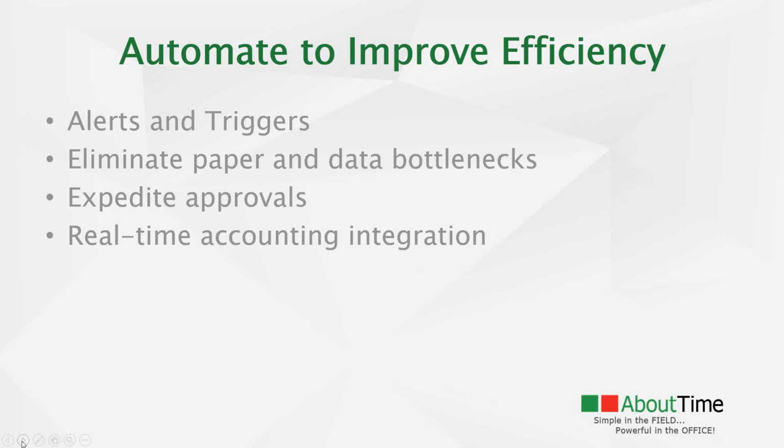Stay home. Or what if we have an alert now that tells us that on this job, we are over budgeted hours. 9 times out of 10 in a paper or Excel environment, you don't know where you are in regards to budget until after the fact, until after payroll is run. We give you the ability to see that day in, day out in real time. We give you the ability to have a daily approval of work, of budgets, of anything that's out there in the field. So that automates efficiency.